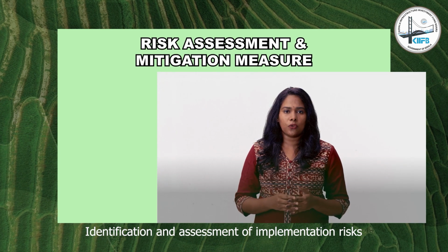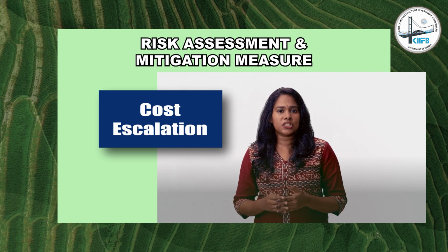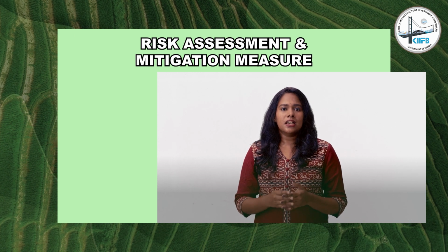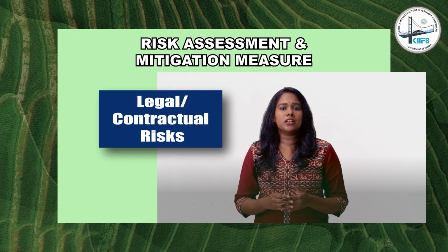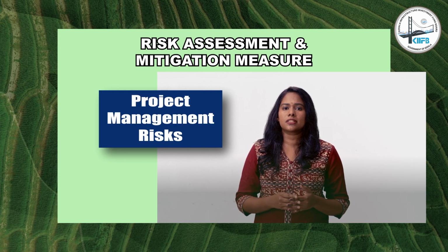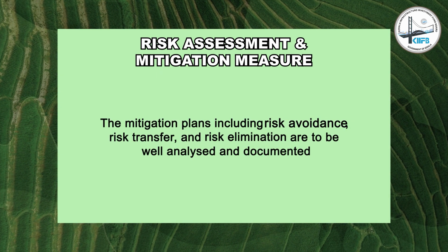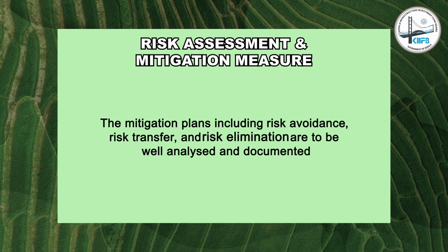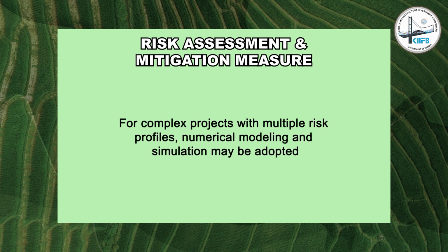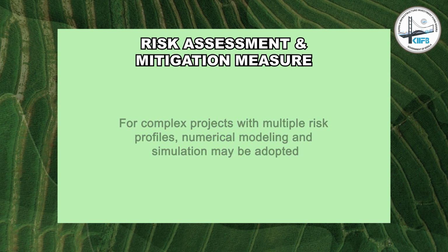Identification and assessment of implementation risks which can lead to time overrun, cost escalation, scope reduction, etc. is the primary stage in risk assessment. Risk analysis could include legal or contractual risks, environmental risks, revenue risks, project management risks, regulatory risks, etc. The mitigation plans including risk avoidance, risk transfer and risk elimination are to be well analyzed and documented. For complex projects with multiple risk profiles, numerical modeling and simulation may be adopted.